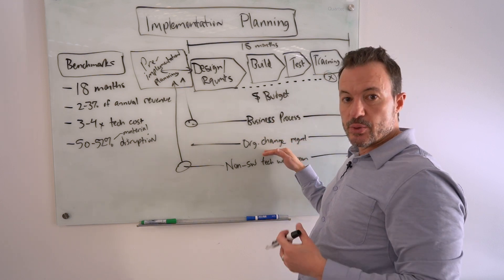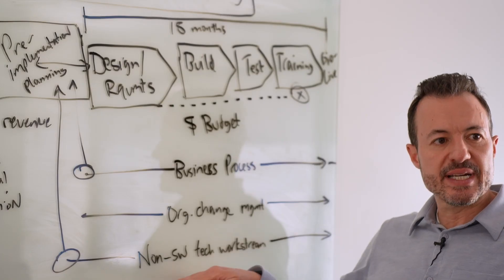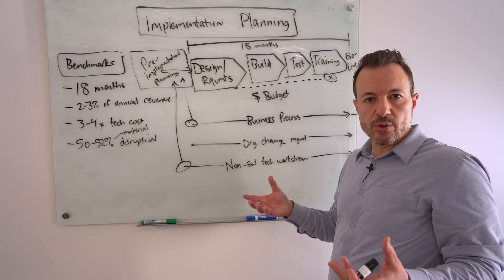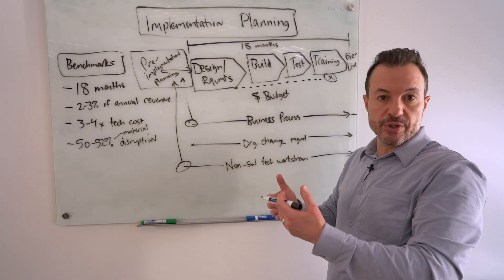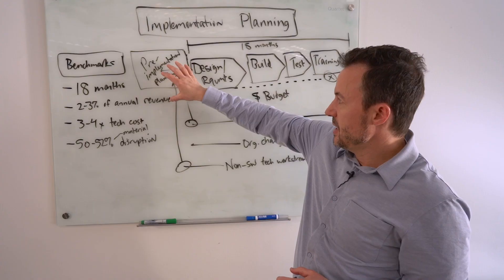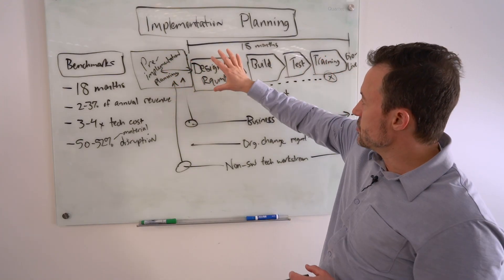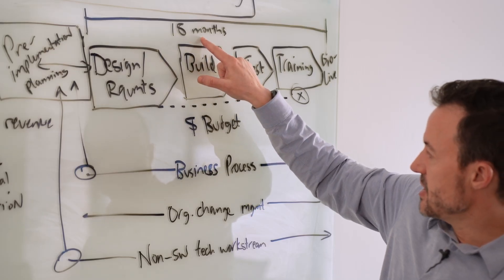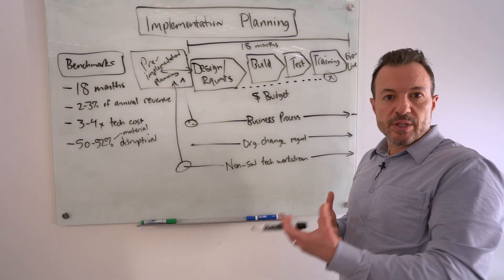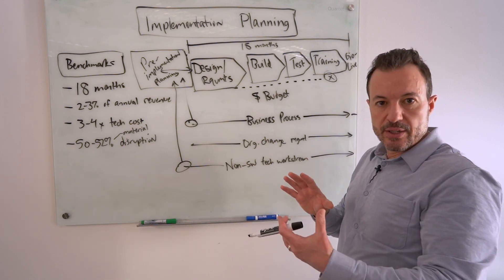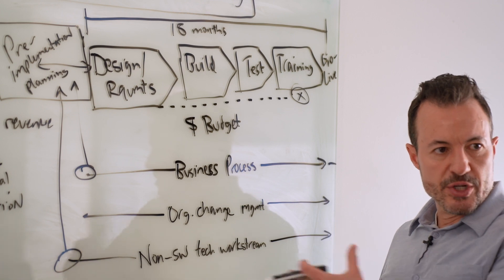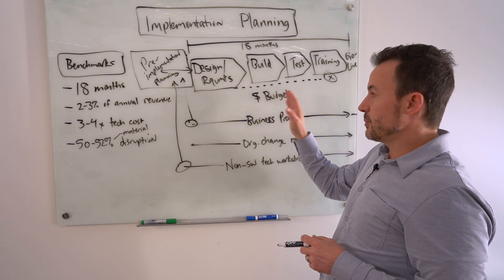Pre-implementation planning involves doing initial change impact assessments, organizational readiness assessments, creating a technology roadmap showing how different technologies integrate, how data will migrate, how systems will be decommissioned, and what interim interface points are needed. The time and money spent in pre-implementation planning gives you much greater clarity and confidence in your overall plan. Once completed, you can flex the vendor's 18-month estimate up or down based on process complexity, organizational change scope, staffing, and available internal resources.